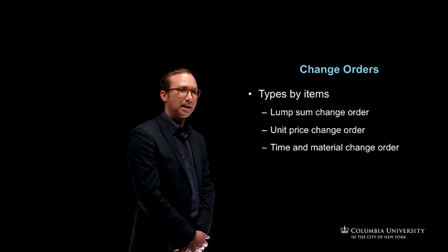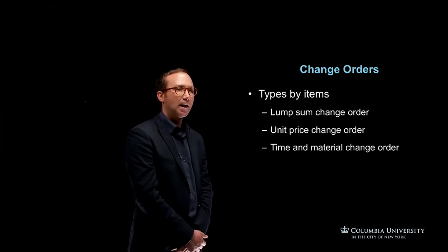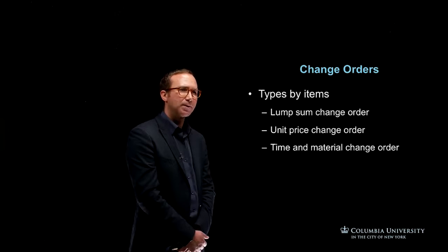You may also have a time and material change order. So that's basically the time it takes to do something and the cost of the material. So an example could be a door that was not on the design, therefore it's not just the cost of the actual door, it's the labour involved to install the door as well.